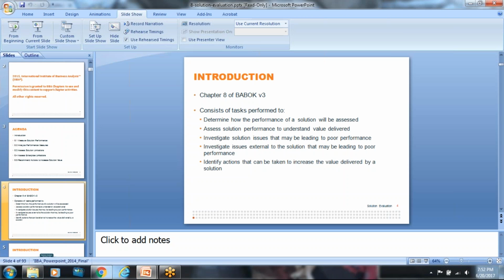If it's something we can't do and is important, that's when we need to huddle and say, okay, can we extend the project? Do we have the money to extend it? Can the business put this in the roadmap in the future? Can the business live without it? And as a BA, do I do my job and help them work around it? I know that's a lot of stuff I just said, but this whole section, those are the types of things that I tend to think of at a high level.